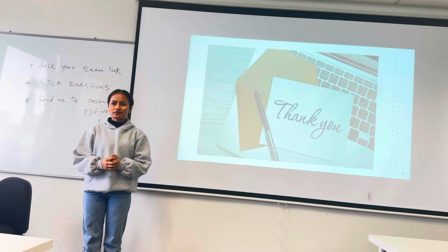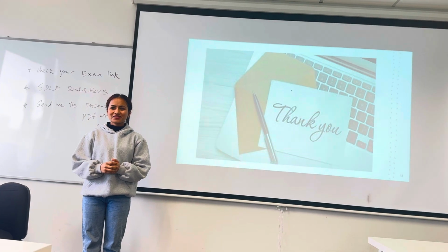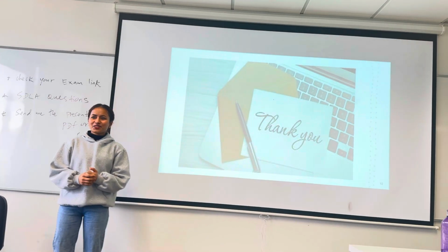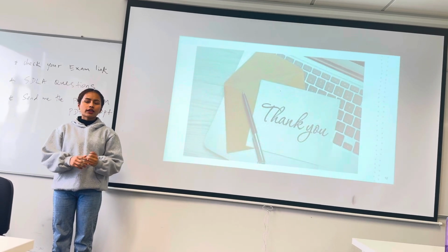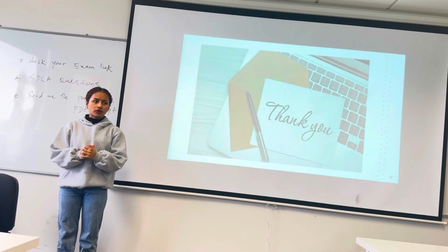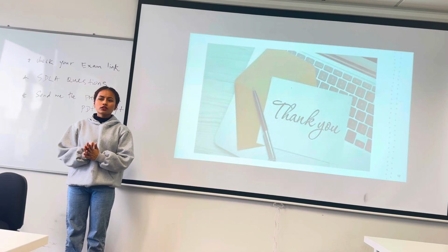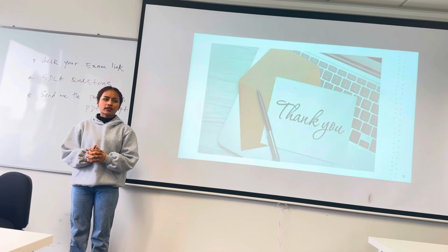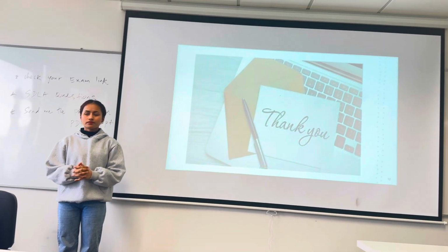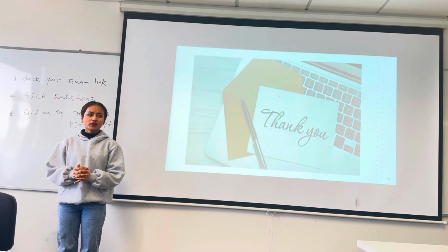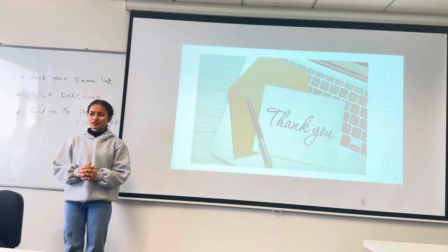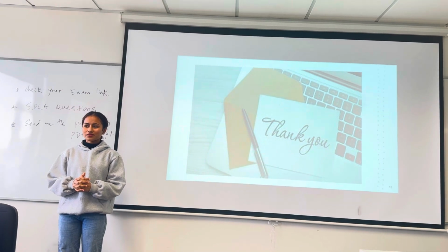One question from my side: what is GFA? GFA is the gross floor area, calculated using the external surfaces of the walls, excluding balconies, parking areas, and so on. What's the measuring unit of GFA? It's the square meter; floor area is measured in square meters.